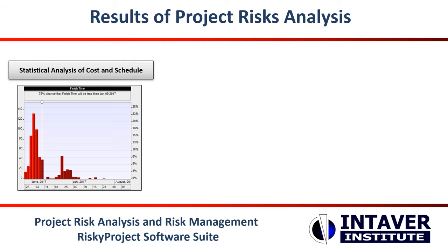The histogram provides information on the probability of certain outcomes. The cumulative probability provides confidence levels on how likely it is to meet specific objectives. In addition, the statistical analysis provides values for means, standard deviation, variance, and other metrics.